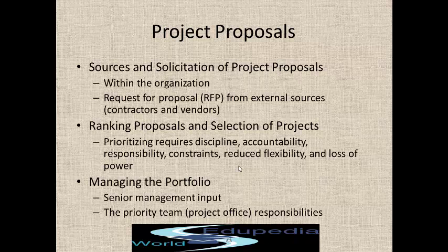There is a project management office, the PMO team, which monitors the projects, the time duration, and the stages of each project: what stage it is in, whether they are going on time, the schedule variance, whether on schedule, on budget, on cost. Then you calculate the earned value, whether they are able to deliver the objectives or project goals as outlined in their project plan.